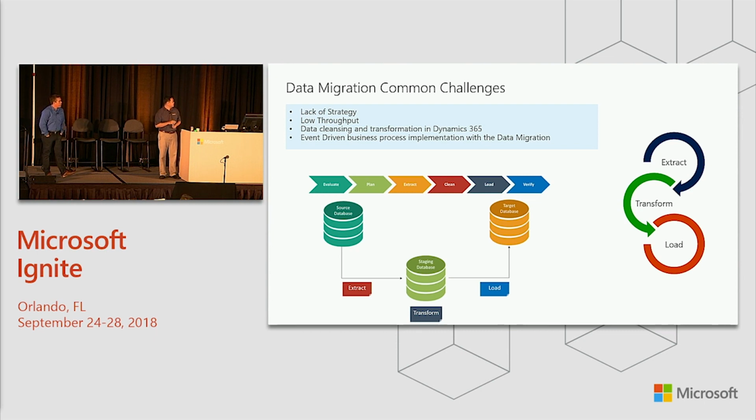Yeah. Another important point for data migration: a lot of the escalations that we've seen are about data quality, right? I can tell you how one of my customers tackles data quality. They have a data quality manager specifically for data migration. Not just the developers getting the data migration into CRM, but a data quality manager. If they have a lot of data that they need to clean up, someone needs to manage it, right? So they collect the data from everybody, and also write checks against the data, to make sure the data going into CRM is actually quality data. Because it's garbage in, garbage out. A lot of times user adoption suffers because they really have bad data in the system. That plays into your data migration strategy as well.